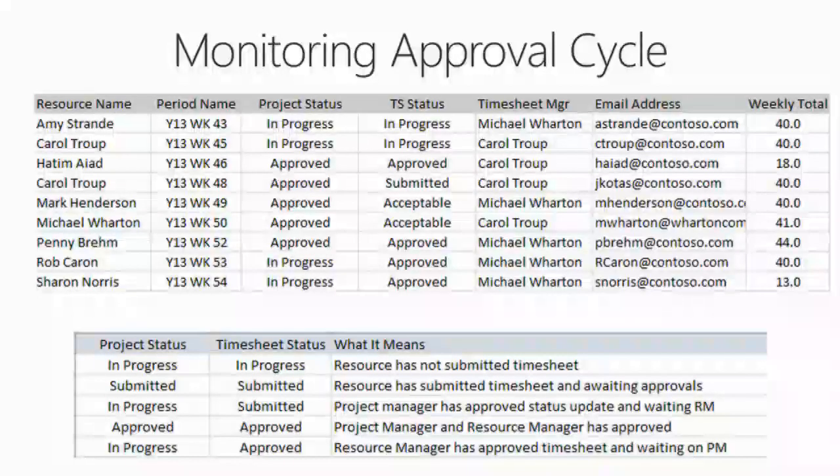And what about your hours? They get a total of 40 hours, right? That could be another governance issue. People putting more than 40, less than 40. Again, that's governance where you can write a query, and if it's over 40 hours, have it corrected. It's all based on what the governance has said. We were thinking about putting a script at the time they submit their time card to do a validation on the time card. So over 40 in regular, don't even let them go through. Under, just stop it there. It will save a lot of problems for the PMO.